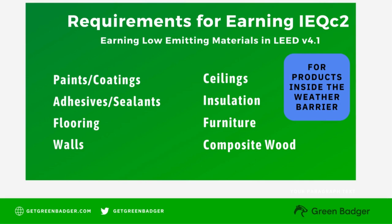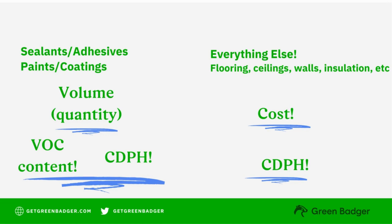For adhesives, sealants, paints, and coatings, three pieces of information must be provided: the quantity used shown in volume, the VOC content (VOC stands for volatile organic content), and an emissions certificate that shows CDPH compliance. CDPH stands for the California Department of Public Health. All the other categories are tracked by cost and only need to meet the CDPH compliance shown on the emission certificate.